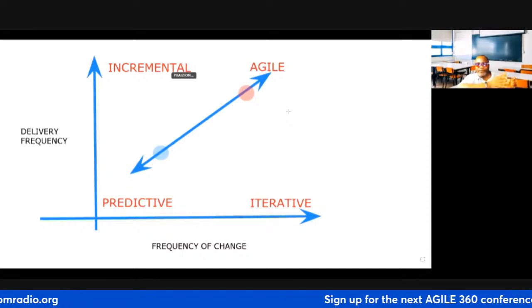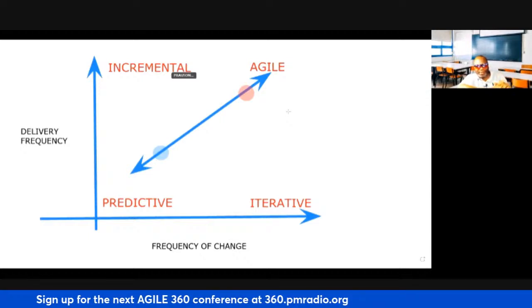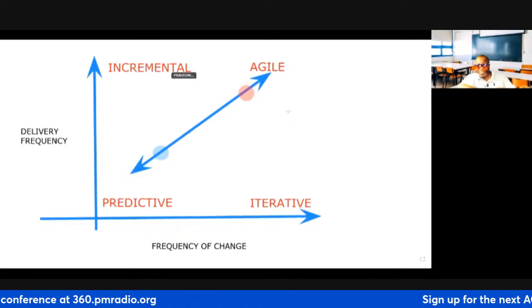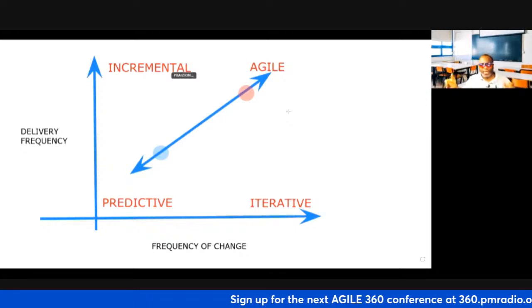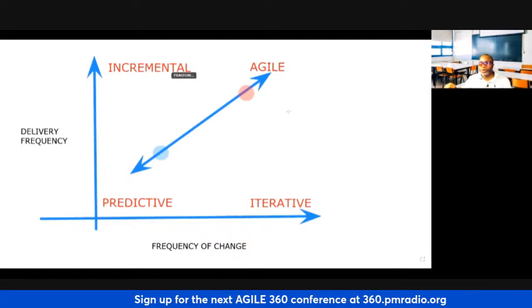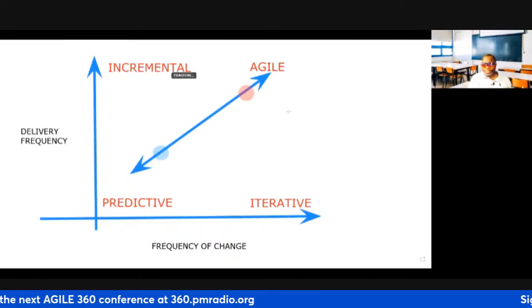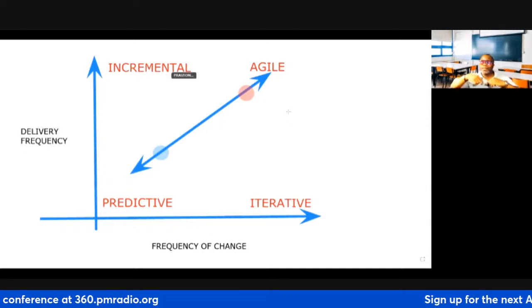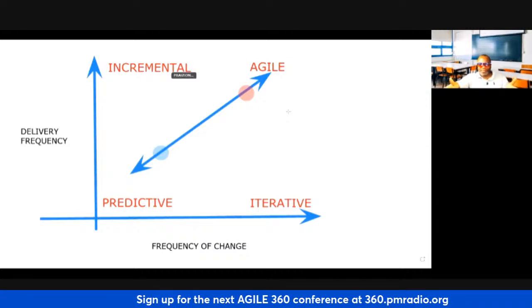So if you combine a phase gate approach, where you're meeting at the end of every phase, plus a daily meeting, that's hybrid. Because in Agile, we don't do phases. But if you're on a project where there are phase gates and you need approval before you can proceed to the next phase, and then daily you're meeting with the team to do daily stand-ups, that's hybrid.